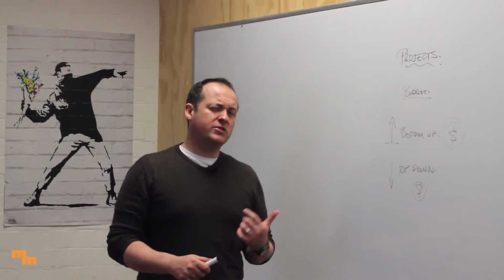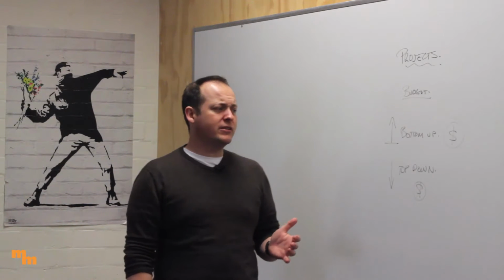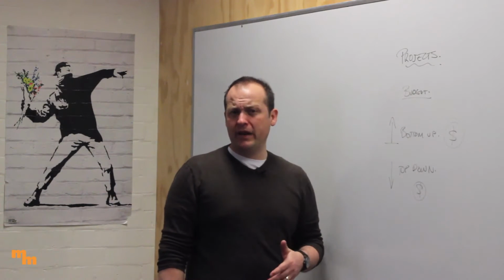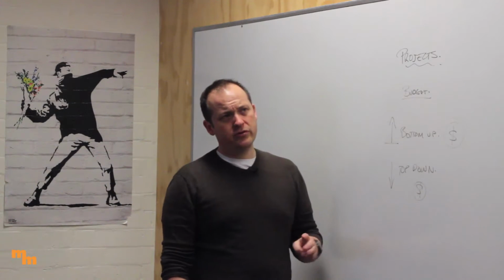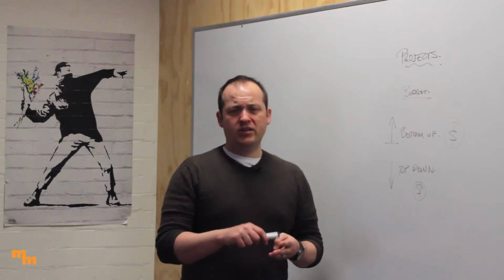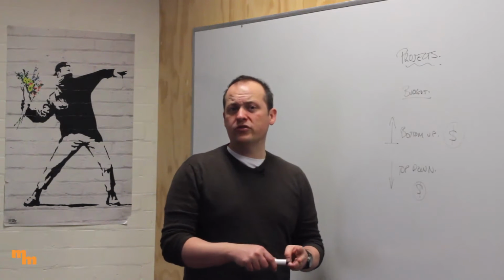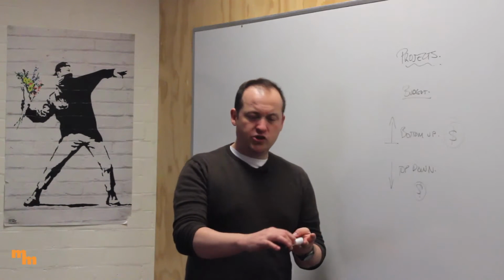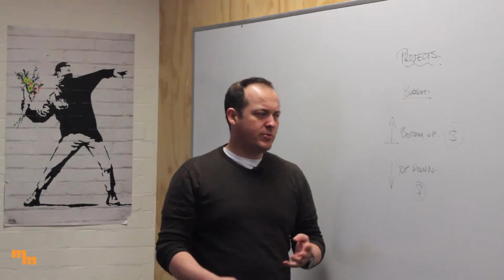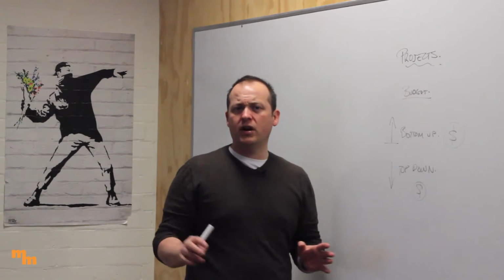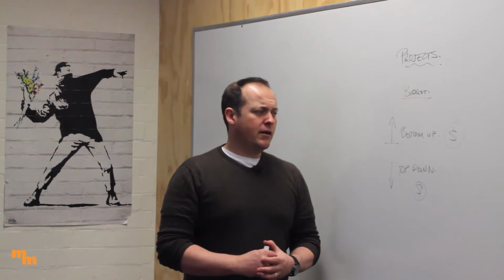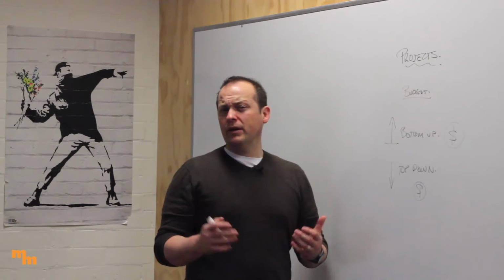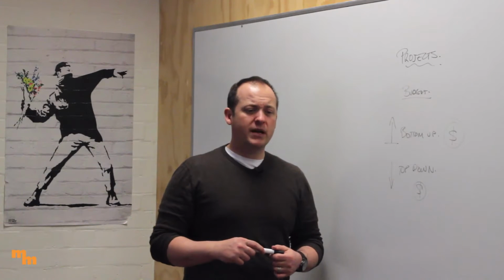Now, if you're going to do that, you need to make sure that if you're working for an organization, they will have policies about how that needs to occur. I know I've worked for places, they say, well, look, if you want to do that, it's under a certain amount, you need to go get 3 different quotes. And then you're going to choose the cheapest quote or whatever it happens to be. They'll have some sort of rule, policy or guideline to make sure that you're acting appropriately. So you've got to think about that, who you're working with. Just keep it in the back of your mind.